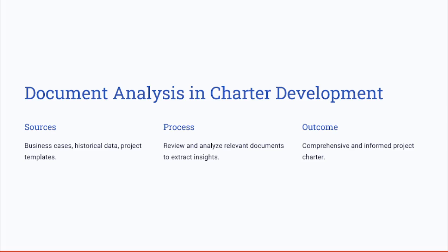Also, an important tool you can use is document analysis when you are creating the project charter. Document analysis involves reviewing existing documents like the business case, agreements, or any historical data that has been used by other project managers or other projects. That will ensure that the charter is grounded in reality and aligned with the organization's goals.